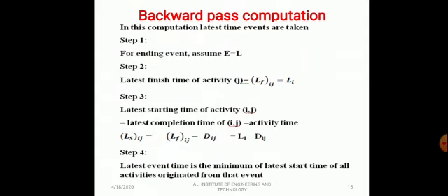Step 4: the latest event time is the minimum of the latest start times of all activities originating from that event.